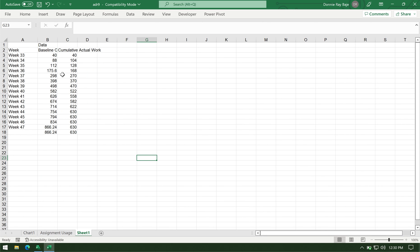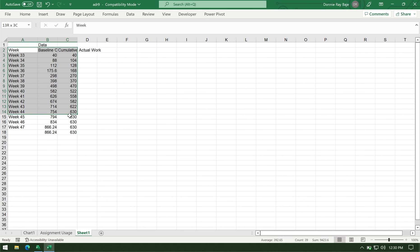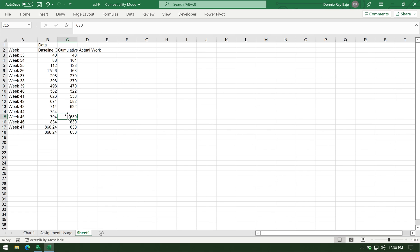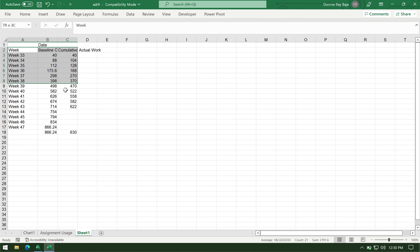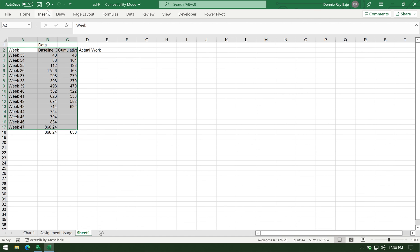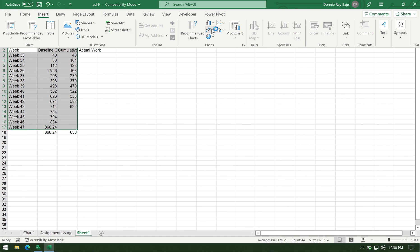And now, I'm ready to create my pivot table or my S-curve. So, I simply have to highlight the headers and the week. But before that, I think we have to remove this first. So, I will remove the week 44 onwards because remember the project is still ongoing. It's still there. So, I have to highlight these two columns now without the data here and then insert and then line chart.